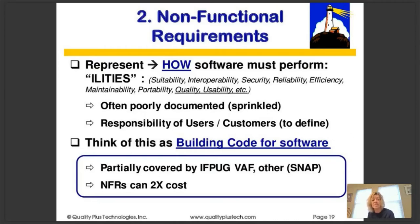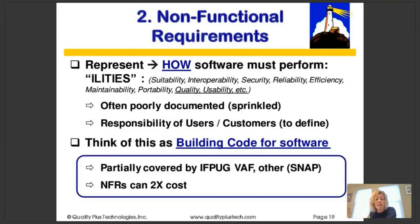Non-functional requirements are partially covered by something called the value adjustment factor within function points. There's also another method called the Software Non-Functional Assessment Process (SNAP) that sizes the non-functional aspects of software. Non-functional requirements or NFRs can double the cost of a piece of software. So we have the floor plan sized in function points, and then the non-functional requirements — covering how good, how well it must perform, how fast, how secure — addressed through the value adjustment factor or SNAP.